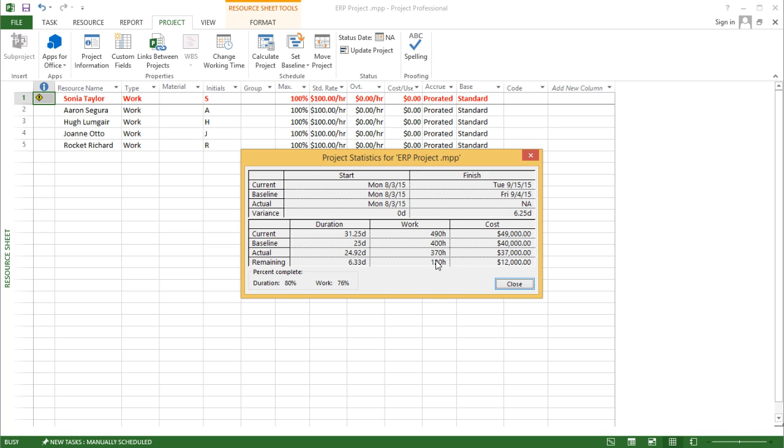I see the hours here as well. I've spent 370 hours so far. I think I've got 120 hours remaining. That means I think I'll be spending in total 490 hours, and I'm about 76% work complete.